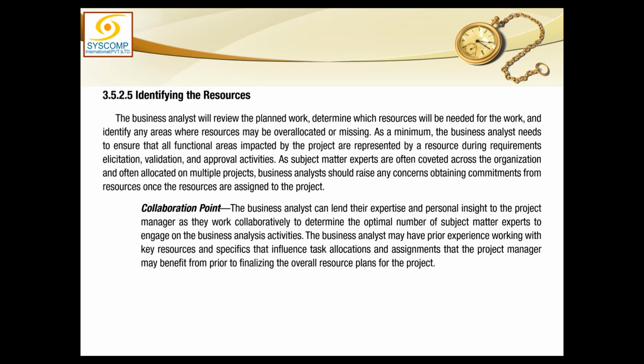Next would be identifying the resources. The business analyst will review the planned work, determine which resources will be needed for the work, and identify any areas where resources may be over-allocated or missing.